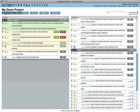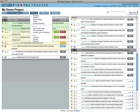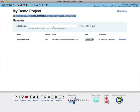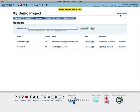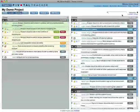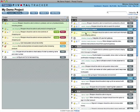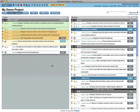So how do stories get accepted? Well, Tracker is built for a collaborative process, with emphasis on constant feedback. The developer can deliver the story when the feature is ready for review, but it isn't done until the product owner tries it out and accepts it.